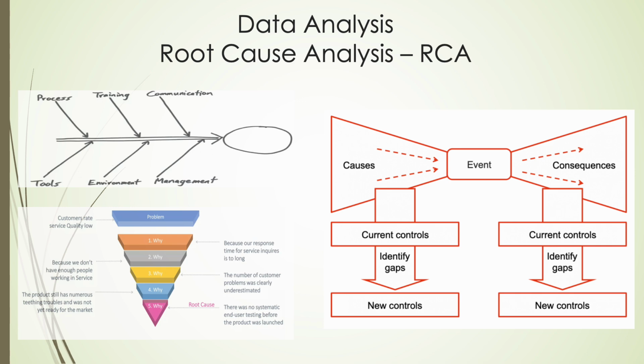Identify major cause categories. Create categories for the potential causes of the problem, often grouped into areas like people, human factors, skills, training, etc. Processes, workflow, procedures, etc. Machines, equipment or technology issues. Materials, inputs or raw materials quality issues. Environment, external conditions like temperature, weather, etc. Measurement, issues with data collection or analysis. Brainstorm possible causes, have the team brainstorm potential causes for each category.